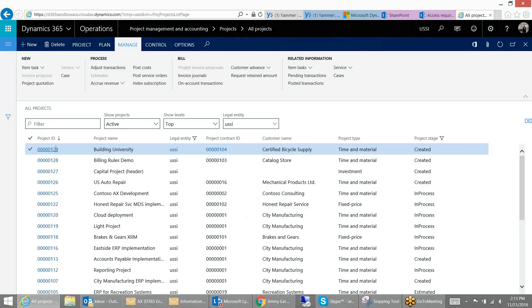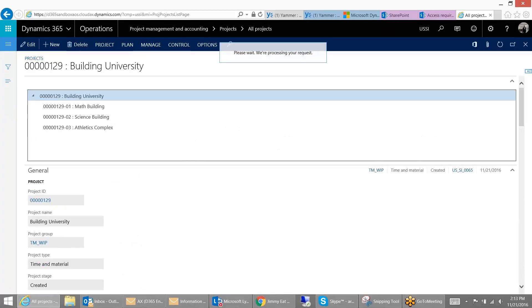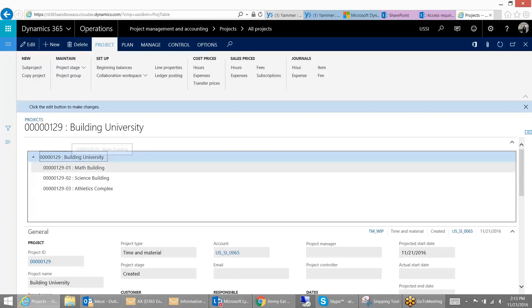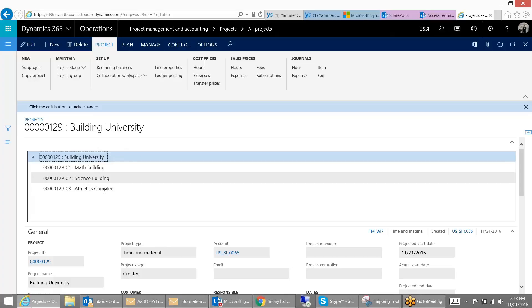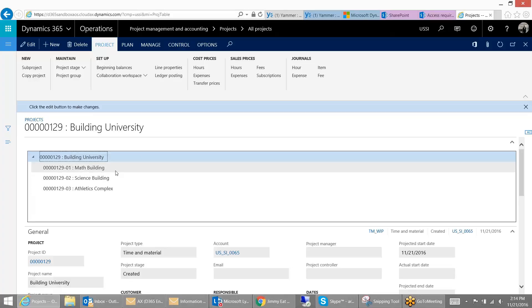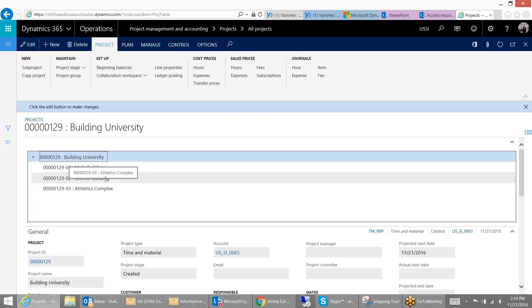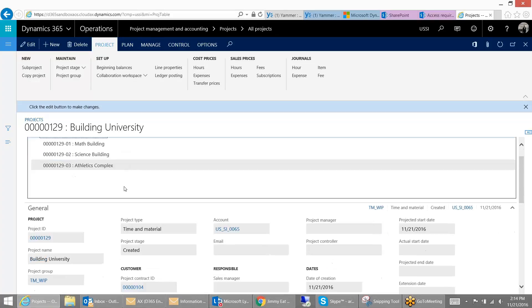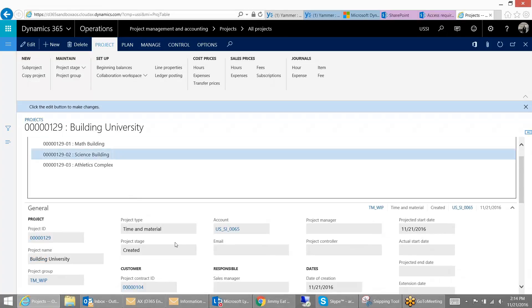So milestone billing is used to centralize your billing for a series of projects that utilize the same contract. In my case, what I've done is I've set up a project called building a university and set up various sub-projects for the different buildings that I'm going to create. Now you can do this using one project and sub-projects or you can do this across multiple header projects. The key is that this type of billing rule only applies to projects that are of type fixed price.